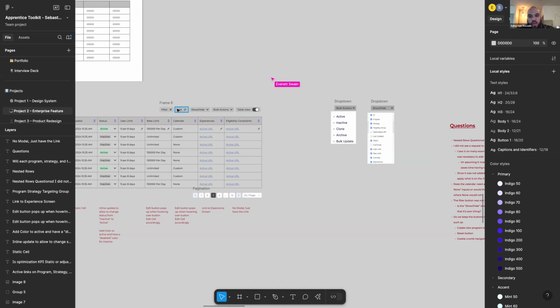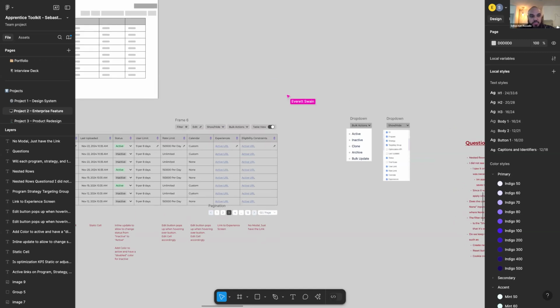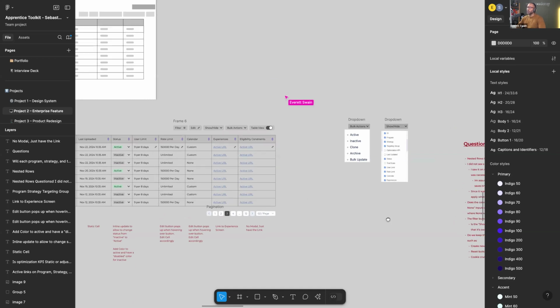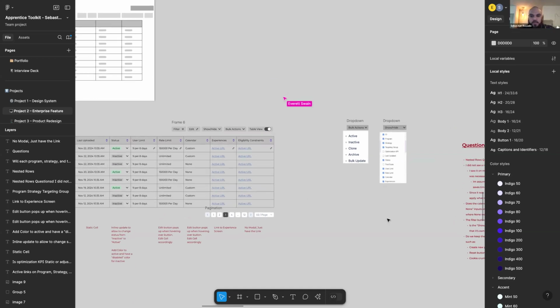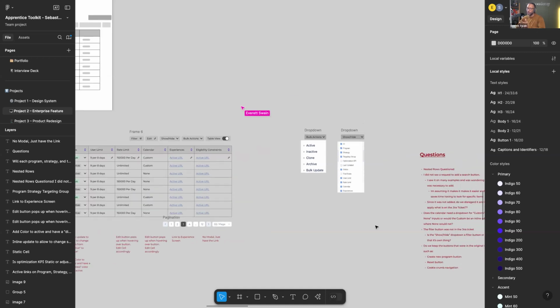I see why they would have it. But if it was left out of the Jira ticket, is it something that we would propose? Exactly, that could be something you propose. Because you've got to think, this is a huge amount of data. Somebody is probably going to want to search it. So the search component is something that we would ask about: I noticed in the requirements there isn't search functionality in here. Is that something we want to explore or test out, or do we not want people to search the data?